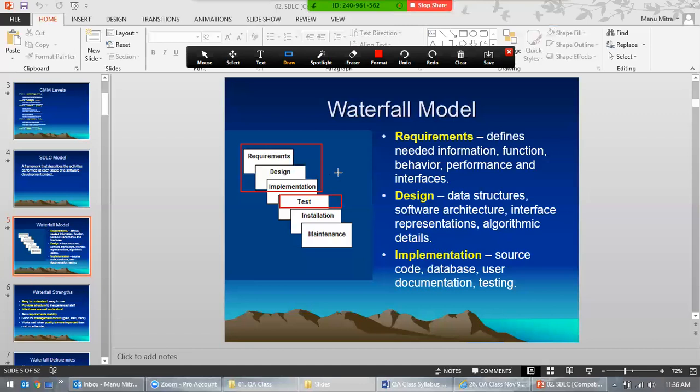Yes. But what happens is, implementations are in this waterfall model. Let me paraphrase this statement. Let's say this is a 6 month project, and your job starts from the fourth month. That is 3 months, you were hired in the first month, and the fourth month will be your testing. So for all 3 months you are saying you will not do anything, only because you said we are starting from test and have nothing to do with all this. So for 3 months you'll be just doing nothing. And the client doesn't pay to be idle.